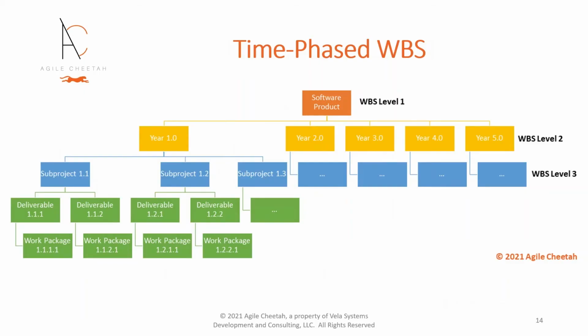Large-scale projects can take years to complete. In such cases, it is reasonable and advisable to break up project scope and schedule into discrete phases. A time phase WBS breaks up the project into major phases instead of activities. Rather than planning the entire project up front, planners follow a rolling wave planning approach in which they plan the upcoming phases in detail while postponing detailed planning for later phases. Rolling wave planning affords the opportunity to improve current plans based on lessons learned in earlier phases. It also provides a measure of flexibility to deal with changing project realities.